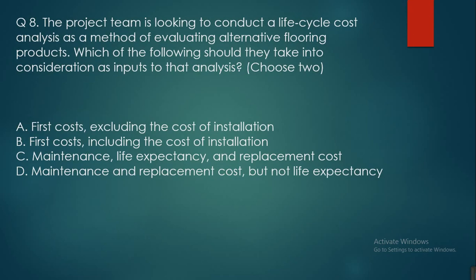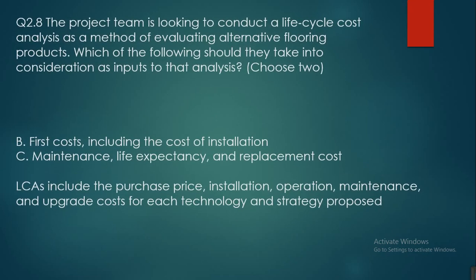Question eight: a project team is looking to conduct a life cycle cost analysis to evaluate alternative flooring products. Which of the following should they take into consideration as inputs? A — first cost excluding the cost of installation; B — first cost including the cost of installation; C — maintenance, life expectancy, and replacement cost; D — maintenance and replacement cost but not life expectancy. The answer is B and C — first cost including installation, and maintenance, life expectancy, and replacement cost — because life cycle assessment includes the purchase price, installation, operation, maintenance, and upgrade costs for each technology and strategy. That's all, thank you for your patience.